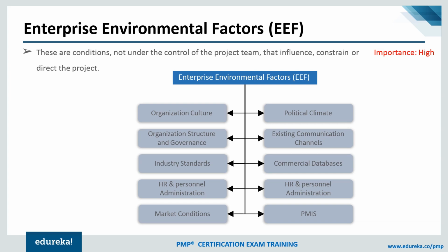For example, your existing communication channels. Let's say you are a project manager in an organization where no approval can be given over email. It has to be in a written or printed format, and that has to be physically signed, and only then will the approval be accepted. Now this specific input may impact your overall schedule.